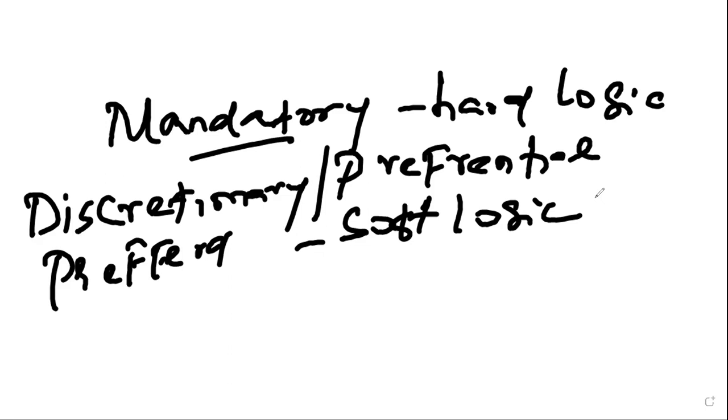Yes. You will not allow your mason to just place the tile unless the ceiling or false ceiling work is completed. You don't want your tile to get spoiled, right? Correct. So that will depend upon the completion of the ceiling work. So this is called a soft logic. The third one will be external dependency. External.